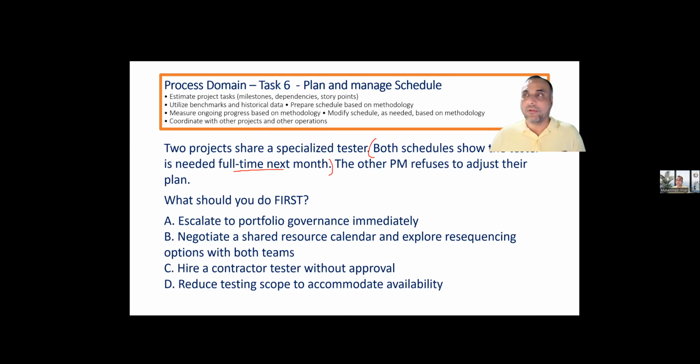Or if you remember during the explanation of project schedule, I told you there is something called pre-booking. We call it pre-assignment, hard booking or soft booking. Ultimately, hard booking is you get the resource by paying for it in advance. Soft booking is you provide the resource calendar so it remains in your control. So before reaching the answer, you should have the answers by yourself.